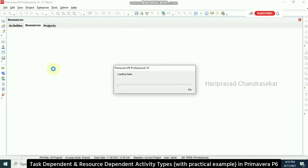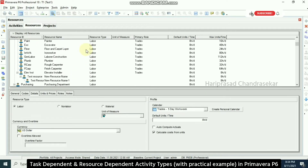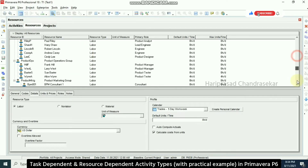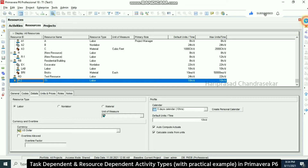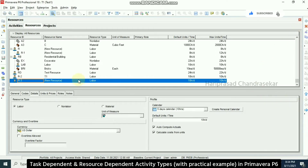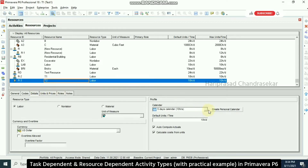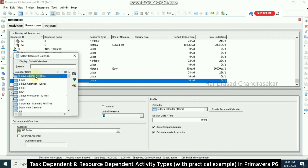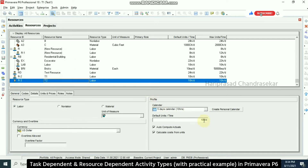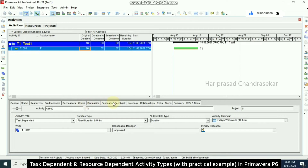Now I'm going to resources to create one resource. I'll give it a resource name and go to details, where I'll select a five-day calendar — every day 10 hours, only five days. So this resource will have a five-day calendar.